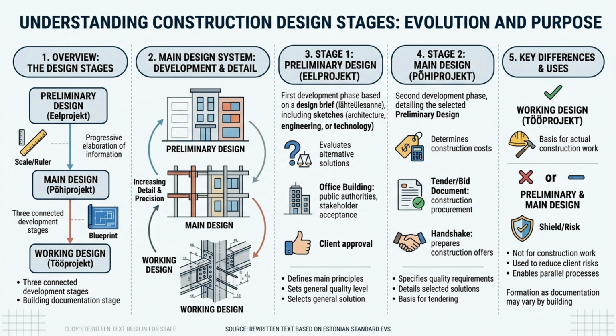The final stage, called working design or e-õppevara, is the most detailed phase of the process, the direct basis for actual construction work. At this point, all necessary construction drawings, technical details, and specifications are completed, making the information suitable for use on site by builders. Unlike the earlier stages, which are not sufficient for construction alone, the working design includes everything needed to start building.